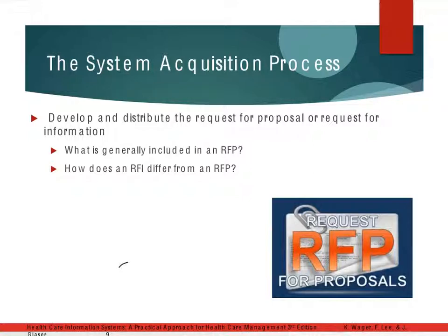So you and your team are going to have to develop a request for a proposal, an RFP. And it's going to be a list that vendors can work from that identifies the system requirements, the features, the functions, and some of the other special requests that you have. And that's important for you to articulate what the specific needs are for your